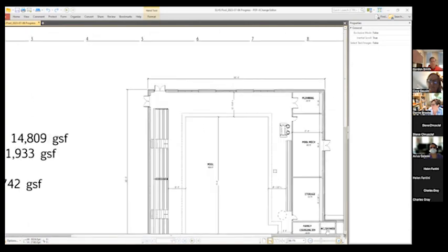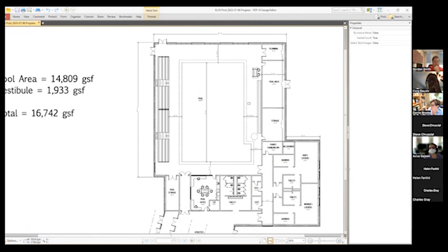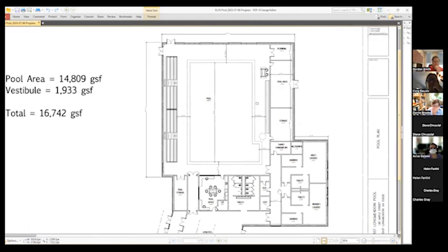Dory, can you repeat that about the link between the two? The building code for swimming pools ties the number of toilet fixtures in the restrooms to the depth or volume of pool water in the pool. Strangely, so we actually just want to confirm the volume of the pool as a whole by figuring out the depth of both the shallow and the deep areas of the pool and where that line divides. So that'll just help us confirm that critical cost of the project. Got it. Thank you.